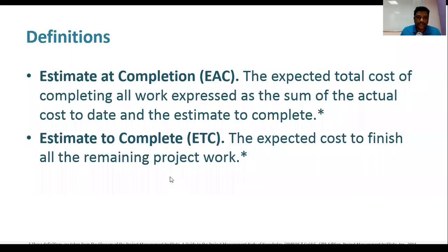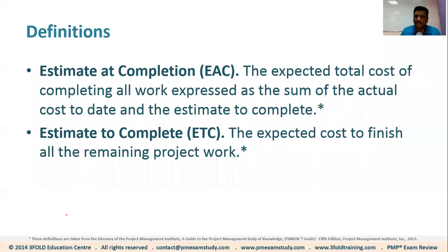Someone is asking, can you show us in curve form the CPI and SPI? Well, you cannot really show that in a curve form. With the CPI and SPI, you can do trend analysis, but you cannot really do the curve form. But I can show the cost variance and schedule variance in the curve form, which is this S curve, and this is your BAC.